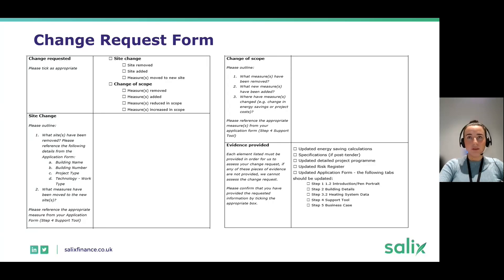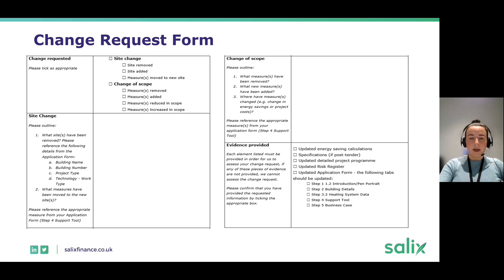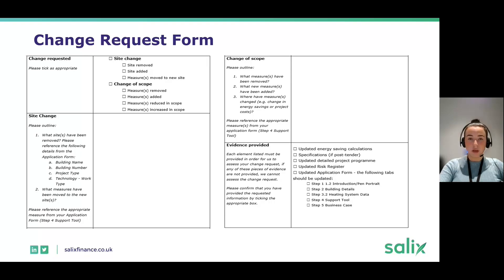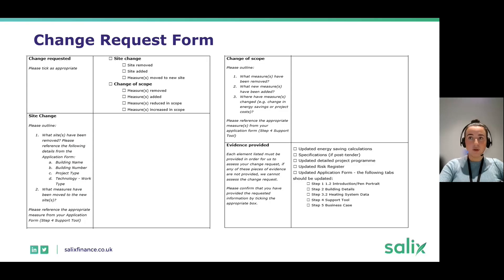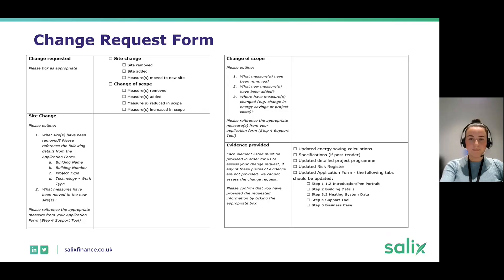It's really important to provide energy saving calculations, any data sheets, an updated detailed project programme and risk register, and most importantly, an updated application form detailing in the introduction exactly what has changed. All data in step 3.2 and step 4 should be updated, as well as the cost breakdown in step 5 if that has changed.